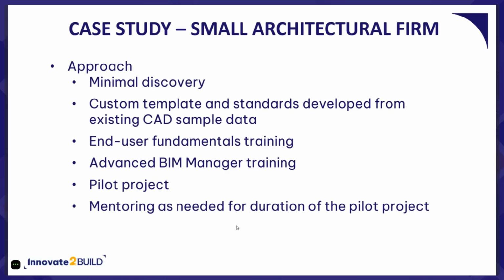We did fundamentals for the end users, and then we did some advanced BIM manager training for just a couple, maybe three people in their firm, not very many people at all, but just more training on how to maintain the template moving forward, how to create custom content, that kind of thing. And then they did a pilot project, and we mentored them through that pilot project. Fairly cut and dried implementation. Again, small firm. The smaller the firm, the easier the implementation.